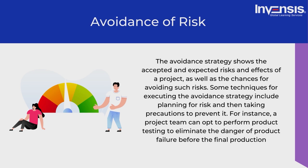The second risk mitigation strategy is avoidance of risk. The avoidance strategy addresses the accepted and expected risks and effects of a project, as well as the chances of avoiding such risks. Techniques include planning for risk and then taking precautions to prevent it — for instance, a project team can opt to perform product testing to eliminate the danger of product failure before final production.